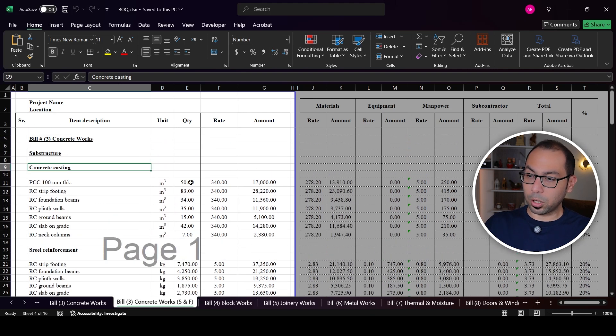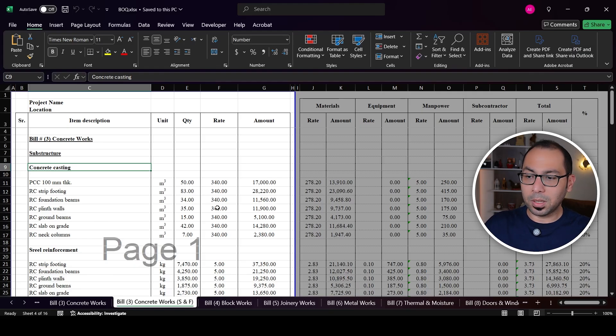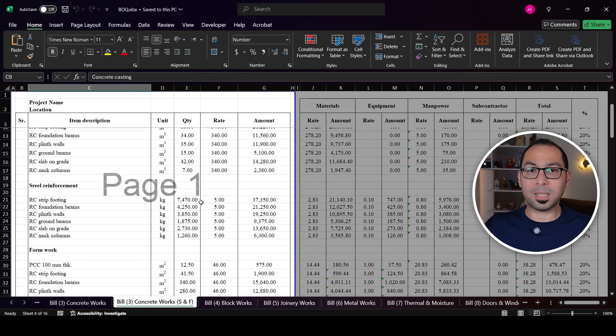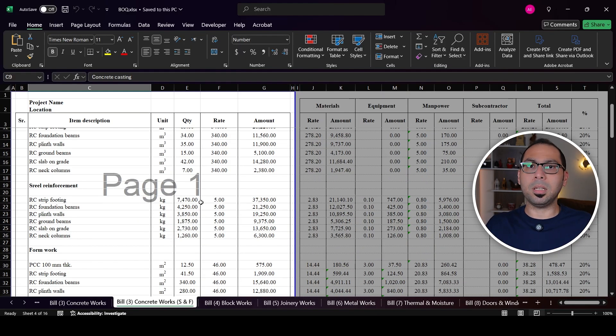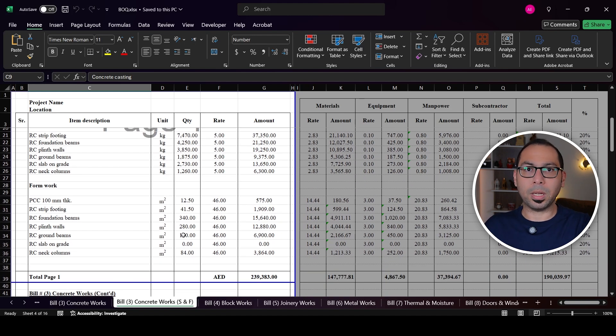When structure elements are measured in accordance with POMI, this is the easier way to estimate the cost. For concrete casting, you need to supply the concrete and need laborers to cast it. For steel reinforcement, you need to supply the steel and need steel fixers to install it. For formwork, you need to supply the wood and scaffolding, and you need carpenters and scaffolders to install the formwork and shuttering.